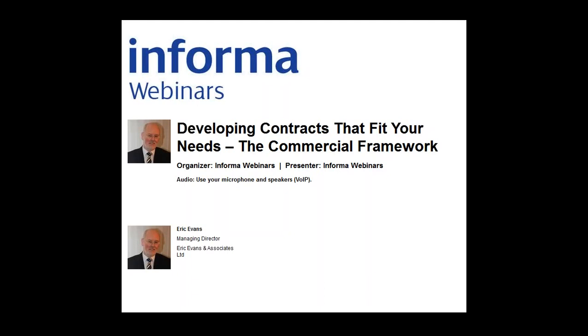And what about force majeure, where the supplier builds something into the contract which says, in the event of things beyond our control happening, we don't actually need to supply the goods? Are we happy with the wording of force majeure? Are we happy, for example, that it includes things like the supplier going on strike and the supplier saying this is totally beyond our control? Are we happy that force majeure does not go on forever, that there comes a point where we have the right to terminate the contract, maybe after 6 weeks or 8 weeks, rather than waiting forever?